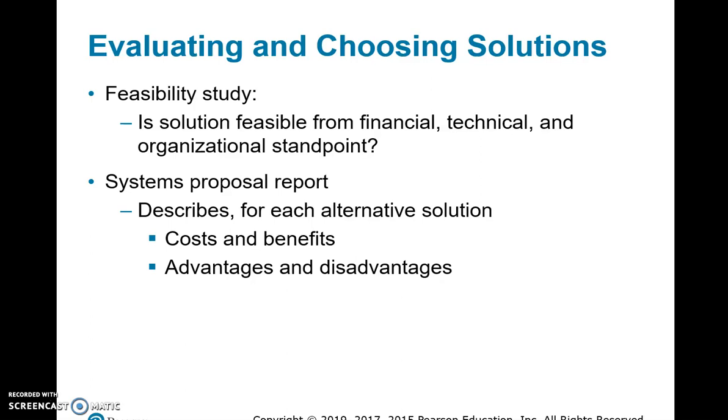The next thing is evaluation. Here you do what is called a feasibility study. Is a solution feasible from, let's say, a financial standpoint, or from a technical standpoint, or from an organizational strategy standpoint? Whether it can be done at all, whether we need experts to do this, whether we need consultants to do this. This is where all the feasibility studies are done.